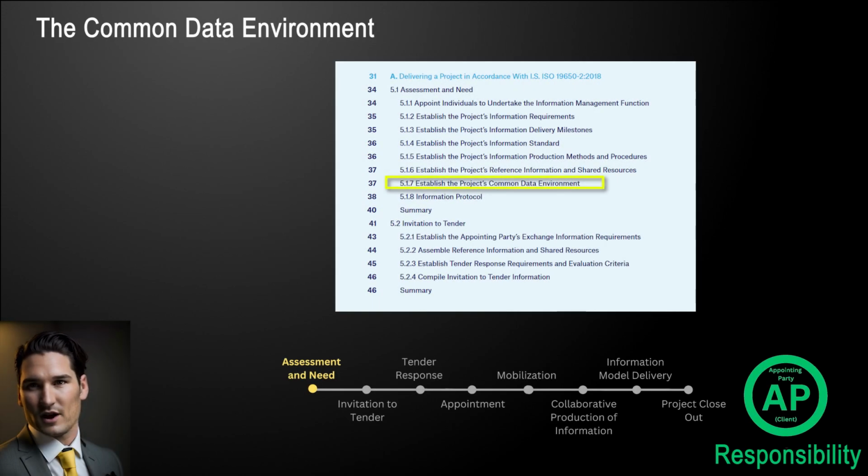The common data environment. The appointing party is responsible for establishing the common data environment to ensure secure sharing of information before invitation to tender. They may also wish to retain control of the CDE and the building information after handover. The appointing party may also transfer hosting responsibility to the lead appointed party, acting as the project information manager.